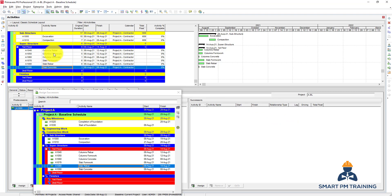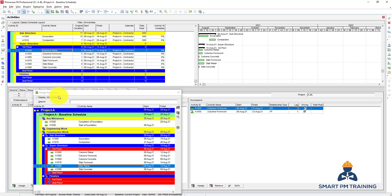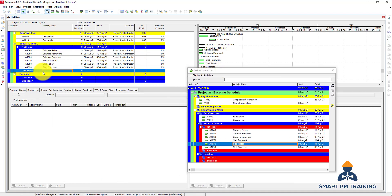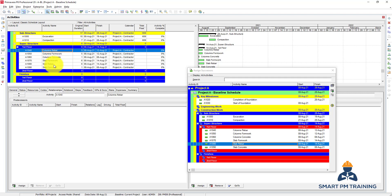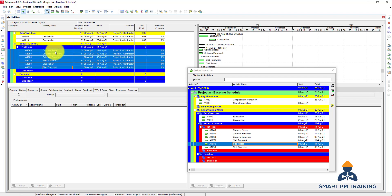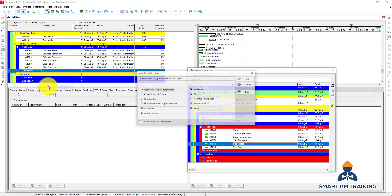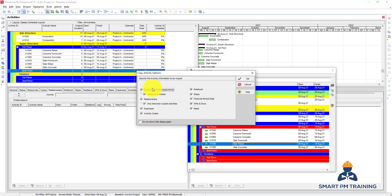Now, if I want to add the same set of activities for the second floor, I do not have to insert activities one by one again. What I can do is select all activities in this fragment or set, click Copy, go to the second floor, and click Paste. It will ask me: do you want to copy everything? Yes - I want to copy the activities and relationships as well.